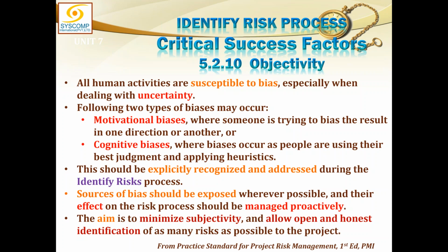So you are not saying something wrong, but this is not based on the true value, which you are believing it to be true. That is a cognitive bias. And if you find this kind of bias, it also has to be eliminated. This should be explicitly recognized and addressed during the identify risk process. Sources of bias should be exposed wherever possible, and their effect on the risk process should be managed proactively.